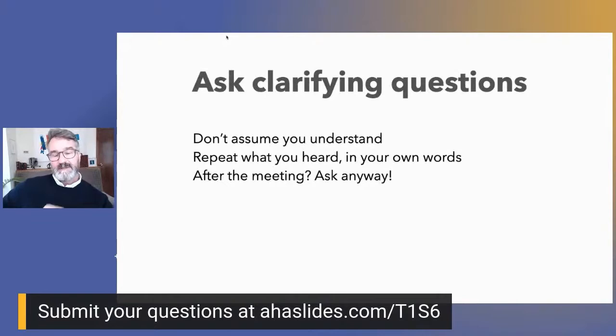Ask clarifying questions as you talk through with the client. Don't assume that you understand what they say. You need to repeat back what you heard in your own words. So think about it. The client says something to you, and then you say, so I heard you say this, did I get this right? And then they would come back and say, well, actually, no, it's a little bit different. It's really this. And at that point, you've come to a definition of what they said. You understand it. They understand it. And then you document that.